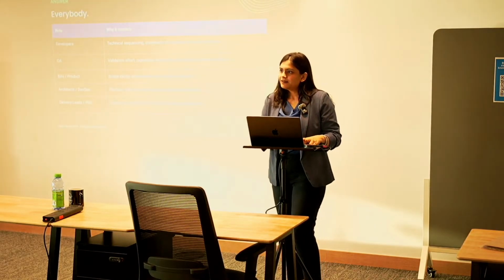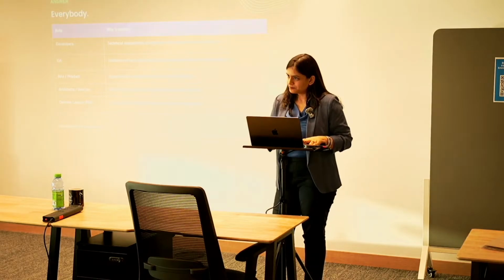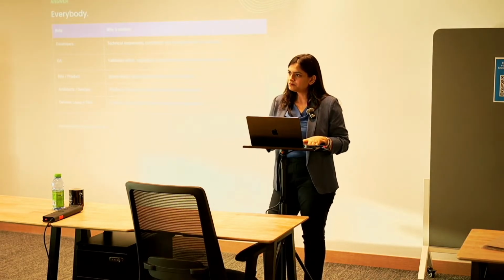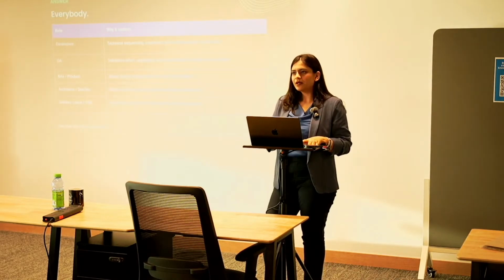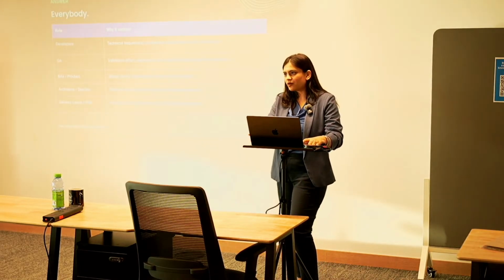And also the business inputs play a role, because suppose there is a festive season or a competitor is launching some product, then whatever features are prioritized can get reshuffled, assigned a new priority, and then assigned to particular releases. Correct. Yep. I think it depends on when you're starting the project as well.